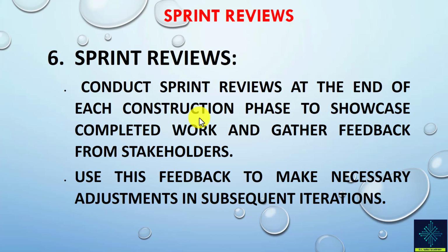Sprint reviews. We have to conduct sprint reviews at the end of each construction phase to showcase completed work and gather feedback from stakeholders. Again, here requirements might change and the priorities of the requirements might change or at least get updated. So here we use this feedback to make necessary adjustments in subsequent iterations.